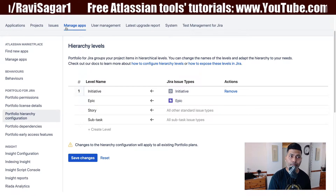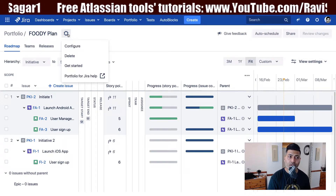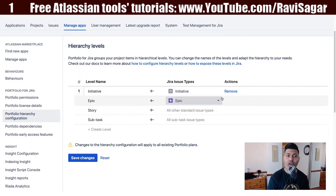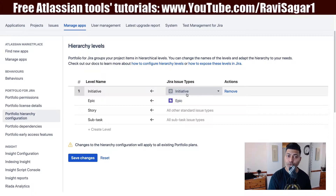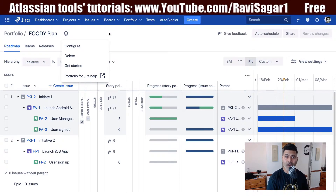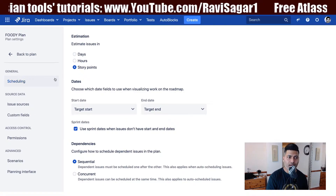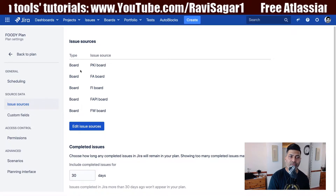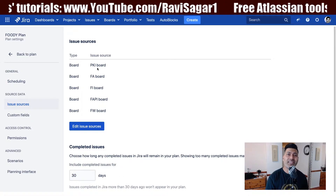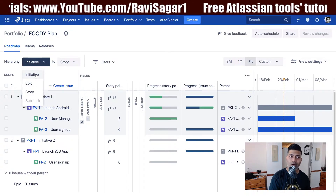The second thing you need to do is make sure the projects you are using in your plan — whether a live plan or the improved interface — have the initiative level or whatever level you create here, with the issue type mapped to that level. For example, the initiative issue type should be part of the project used as your source in the plan. This applies to both improved and live plan.